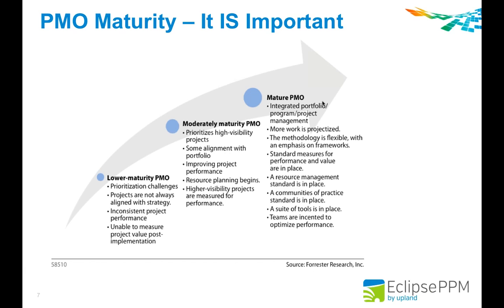You've probably heard this many times before. Have you ever heard a PMO say, well, we only manage projects that are over 1 million in project budget or that have 400 resources or more, right? So it's very common for PMOs to have specific criteria as to what projects they'll manage and which ones they won't. This can lead to several issues such as executing on no or low value projects, partial alignment with business objectives, and incomplete portfolio visibility overall.